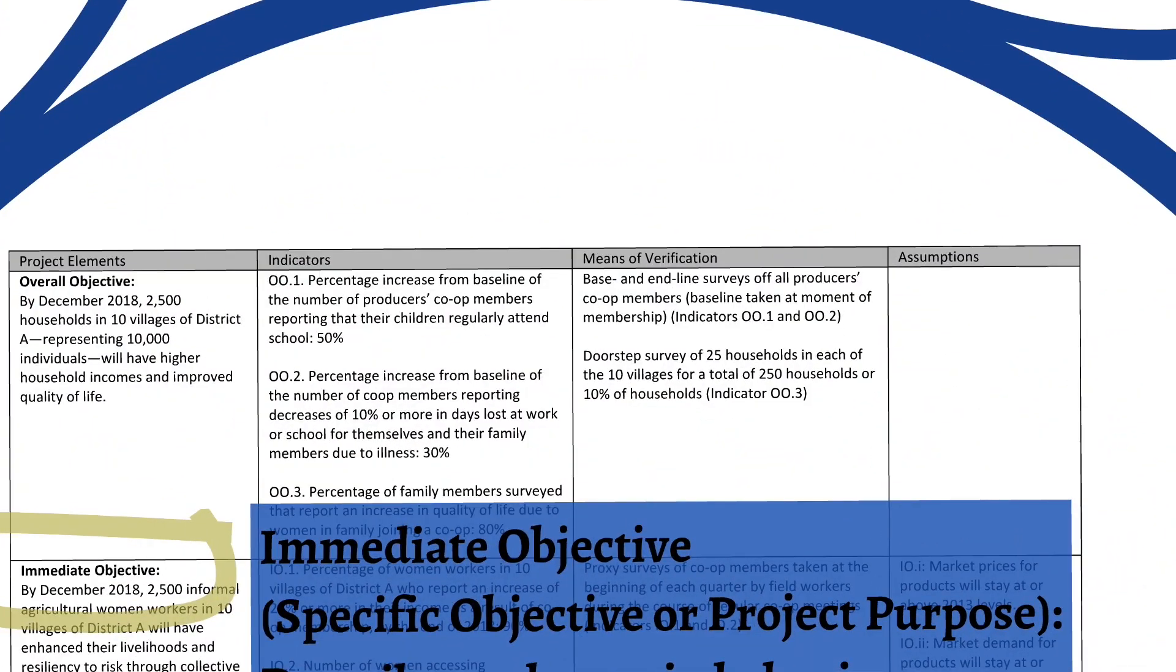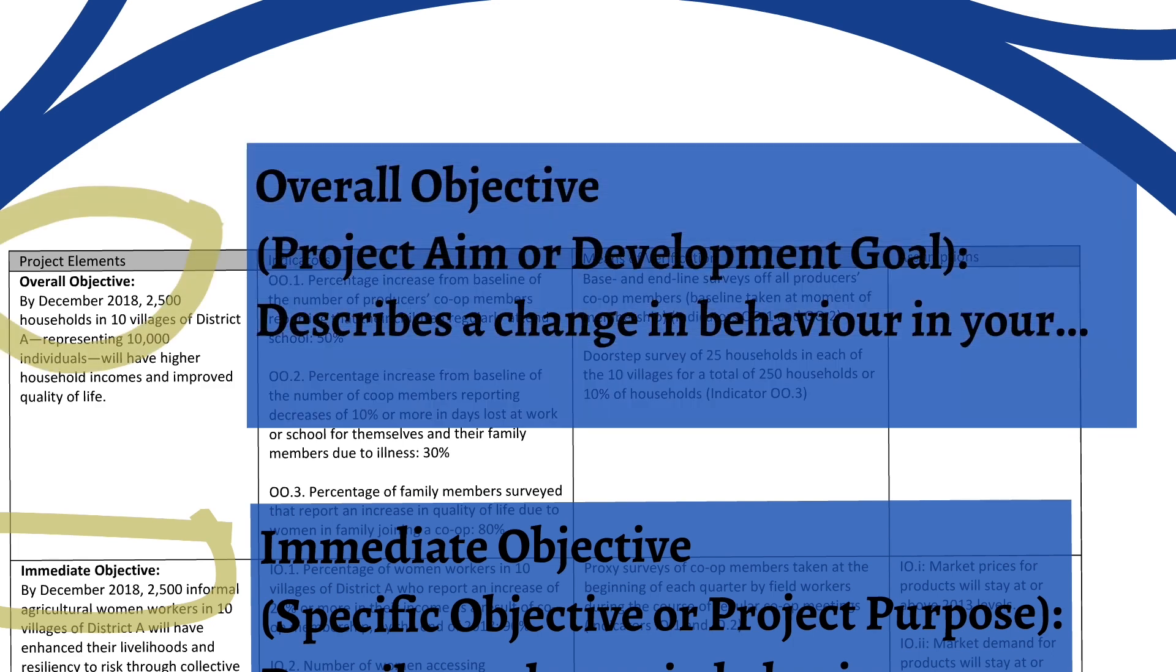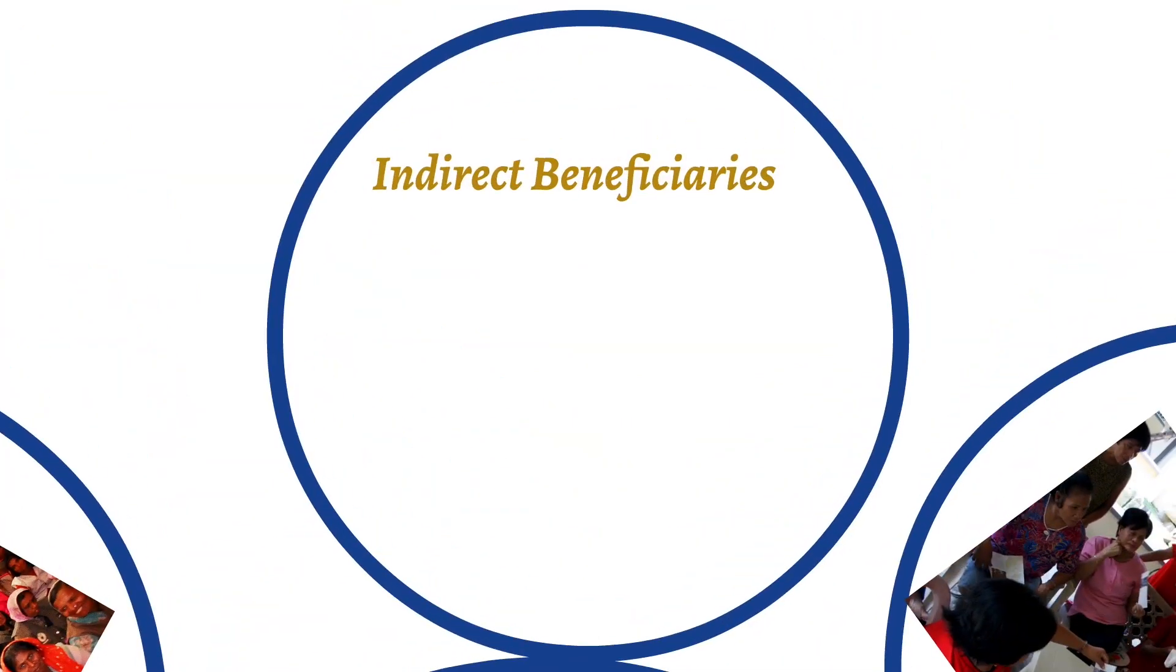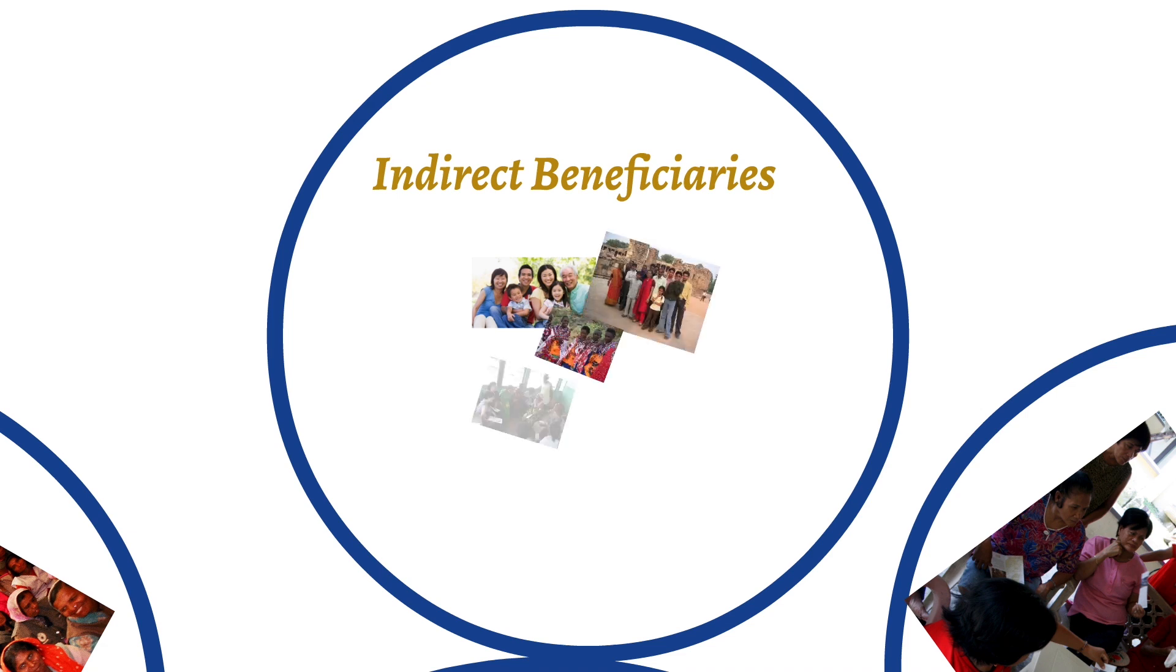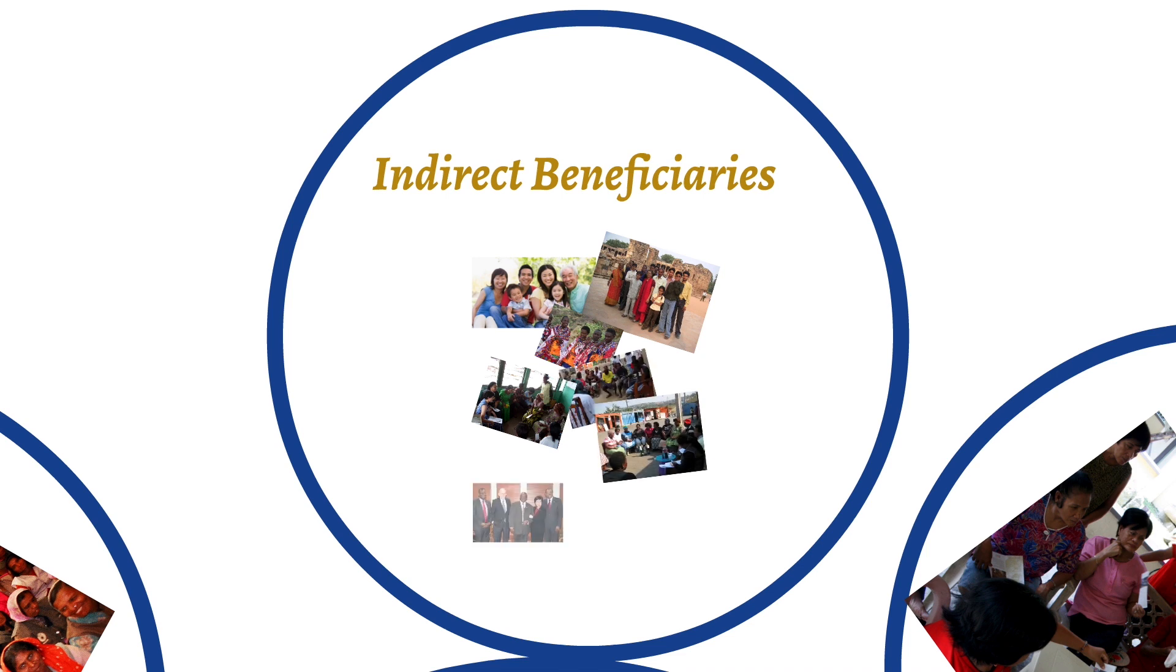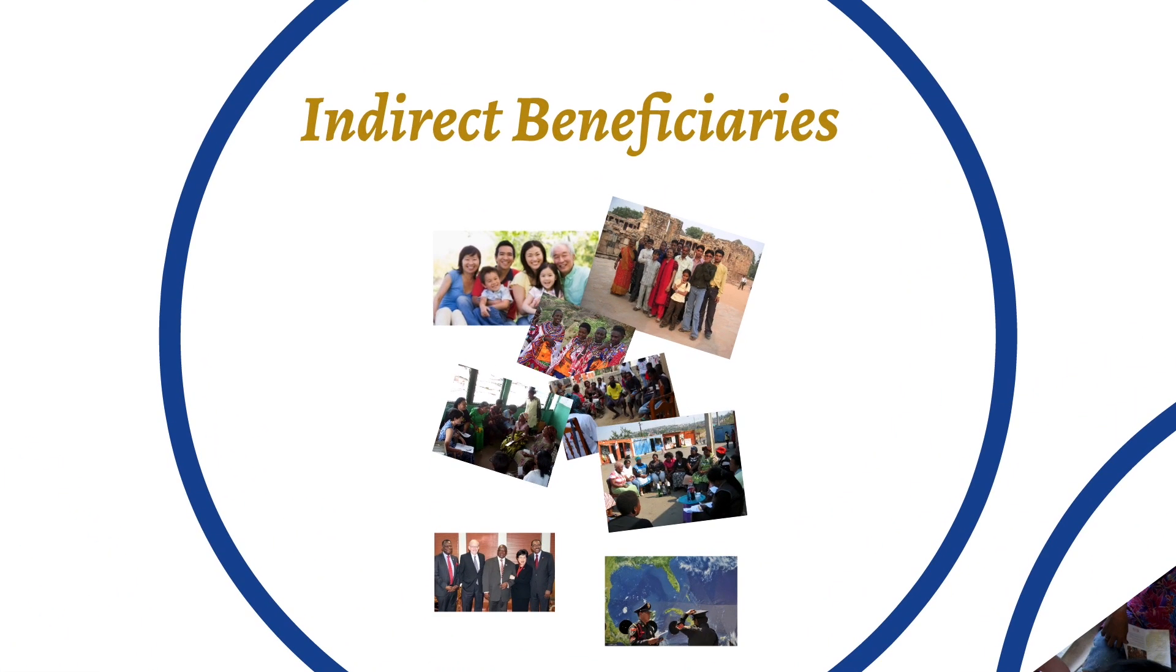The next project element I want to look at is the overall objective. And this is sometimes also called the project aim or the development goal. And the overall objective describes a change in behavior in your indirect beneficiaries. So the target group is your direct beneficiaries. These are your indirect beneficiaries. And they are people who benefit from your project, but who aren't directly targeted by your project. And they're usually benefiting through association with your target group. So they can be members of your target group's families. They can be their co-workers or community members. They could be government officials or police officials or law enforcement officials. Anyone in the community or the families of the target group who will indirectly benefit from the project.